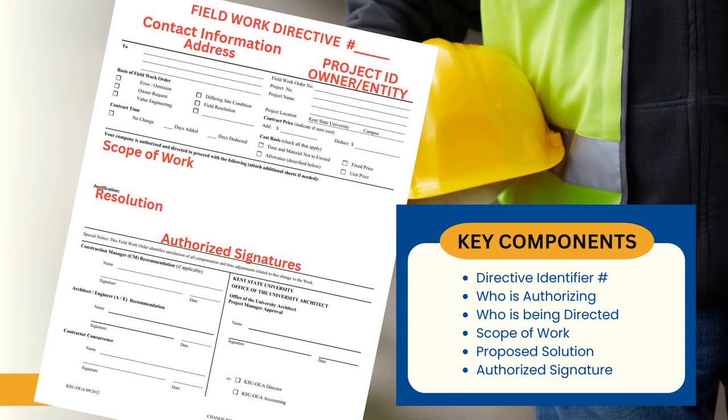Now, again, this field work directive most likely is in response to a small portion of what may become a bigger directive in the future, but that bigger directive would be covered by a change request or a proposed change order to eventually move into an approved change order.